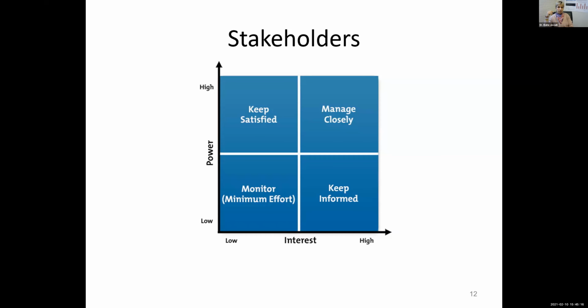Or there is a legal department, they're not happy the way you handle things and they want to make sure your project doesn't get through because it's going to make their life complicated in terms of doing the legal work around it. So those people, those group of stakeholders, they want you to fail. You can say their interest is -1. They want you to succeed is +1, and they're indifferent 0. So the scale is up to you, but you need to do this type of analysis one way or the other.